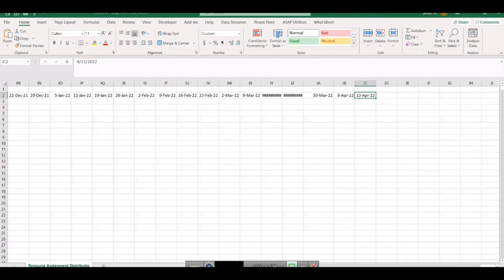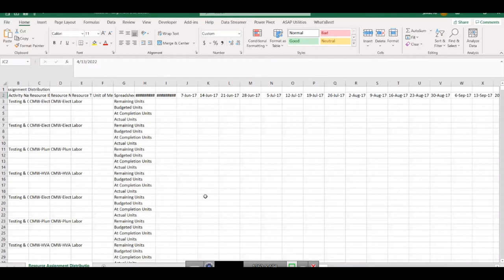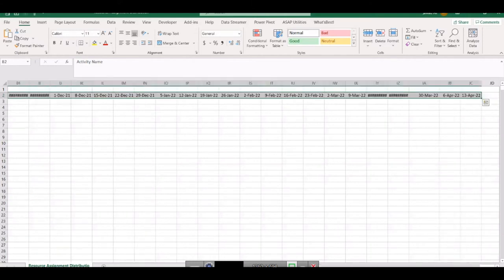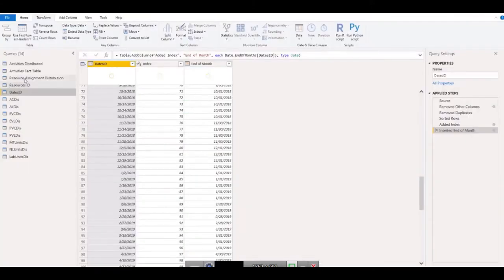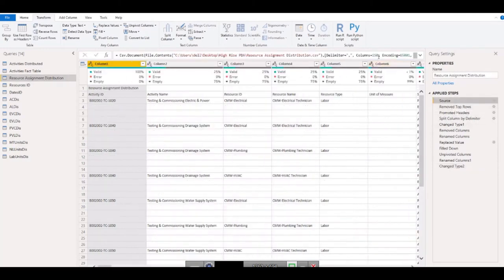So the problem is something inside Power Query that we need to rectify, and this is a common thing, it happens so many times. These are the checkpoints which I was talking about that I will be explaining. So you need to make sure of a few things. How can we do that? First thing, we need to check how many columns are available here. If I check, the number of columns is 262, while if I go and check the number of columns in my source where the dates are derived from, they are only 150. So that means I need to change them to 262.